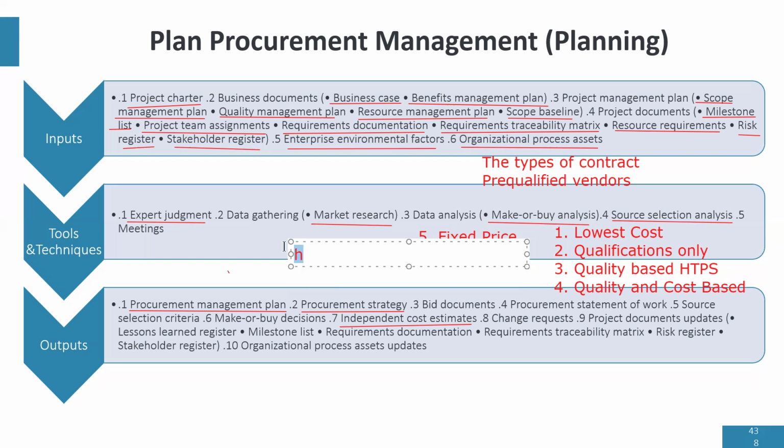Another procurement strategy I've seen, though not listed in the PMBOK, is multi-sourcing. And what is multi-sourcing? You give several vendors different parts of your contract. A good example is the Lagos-Ibadan Expressway, where one part was outsourced to Julius Berger, another part was outsourced to RCC. That's also a procurement strategy, right? Now, bid documents. When you're getting ready for procurement, you're going to create bid documents.